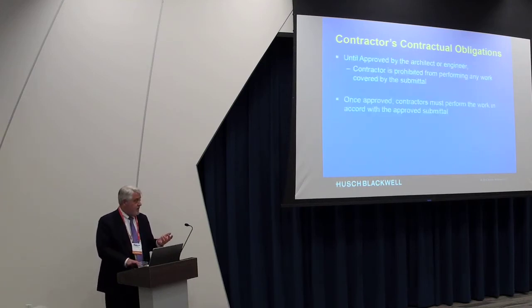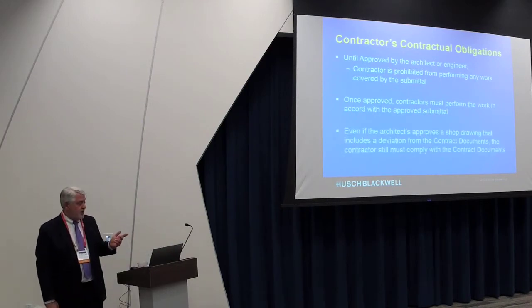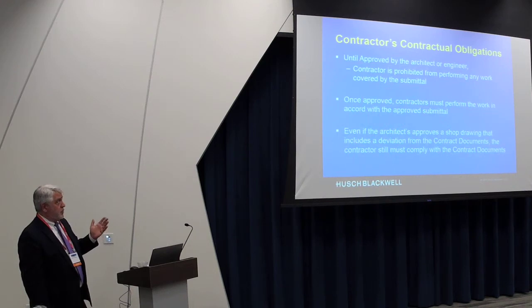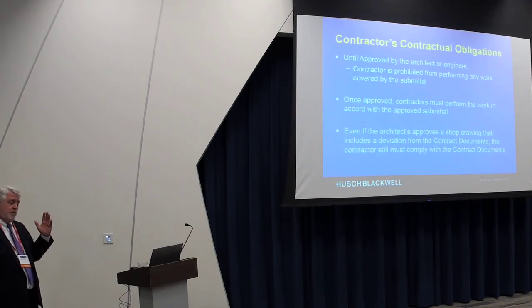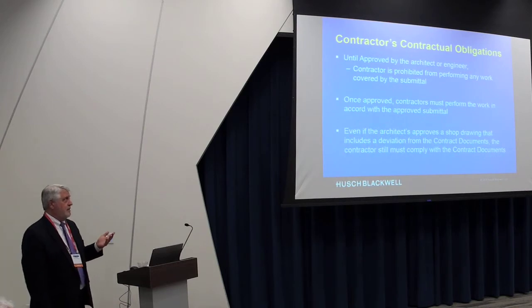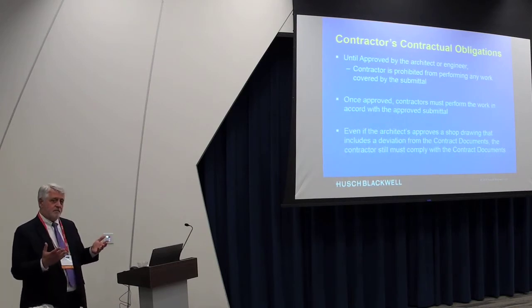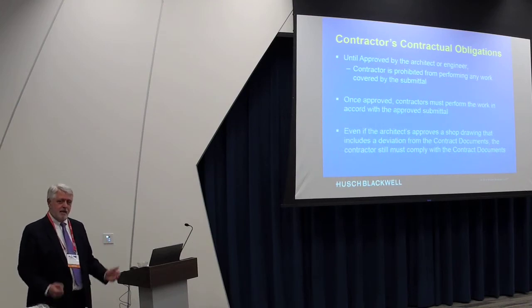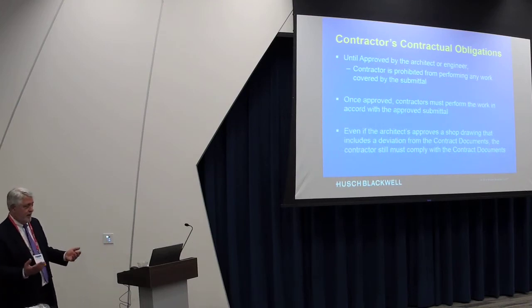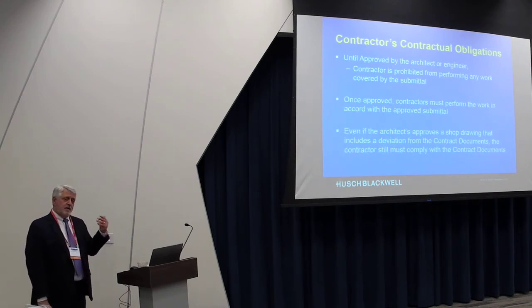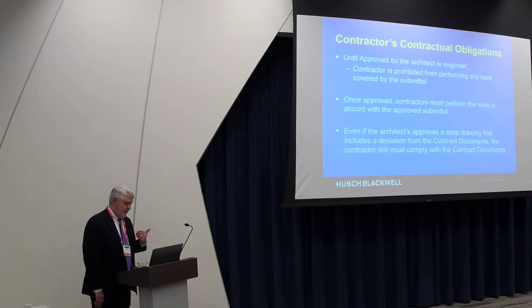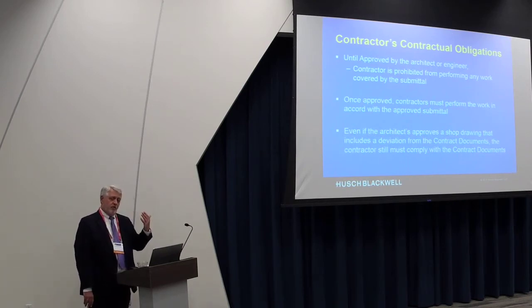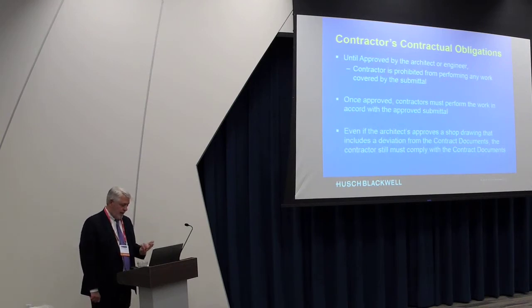This actually is something I just touched on. Until the architect approves under the AIA family, or actually approves the shop drawings, the contractor is prohibited from doing the work. And I say prohibited in kind of a theoretical sense, because you're not going to go out there and stand between him and the foundation wall and not let him do it, right? But if he does do it, he's doing it at his own risk. And if he's not doing it right, you're kind of off the hook, even though you may be out there looking at it.